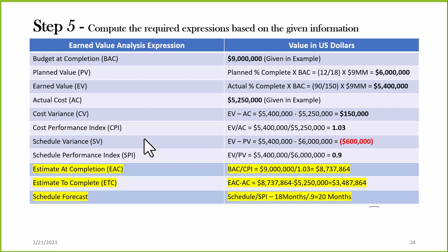But if I'm in the last couple of months of the project and I'm over budget or under budget or over schedule, behind schedule, then I can't react to it. There's no way I can react to it to bring that project back under control so that I will finish it on time. If I wanted to calculate time to complete, then I would just simply go in and do some subtraction there from the schedule based on the new schedule, and I could establish then how many months or how many days, whatever it might be, that I have to complete this project.